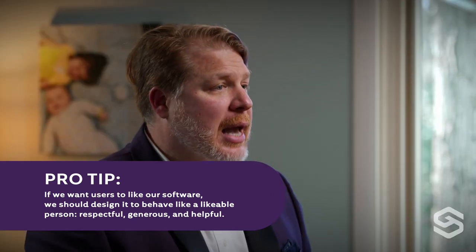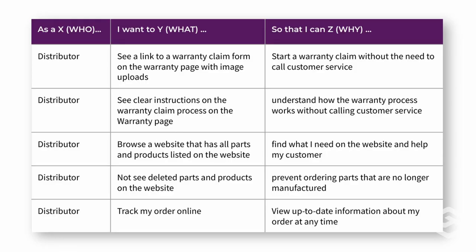You can capture or inventory this however you prefer, but I recommend starting with a number cruncher's favorite invention: a spreadsheet. Let's map the who, what, and why to the following format: 'As an X, I want to Y, so that I can Z.'